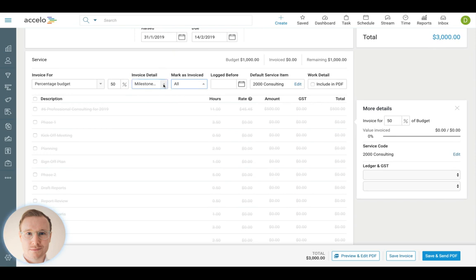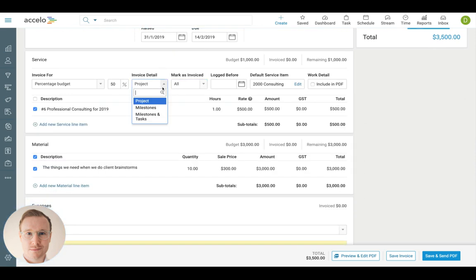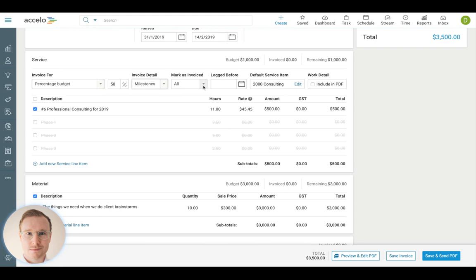The marks as invoiced function means that when you are invoicing for work here, once the invoice has been generated, everything that it has rolled up as far as value here is marked as invoiced and kind of locks that time to a degree. We also have another safeguard here, which is about approval of time. Now, approval of time is really here to cover you for actual or work done invoices. This means that when you're looking at invoicing for work rendered, it's only looking at the time that's been approved by, say, a manager, not looking at all the time before it's been checked and ensured it's accurate.